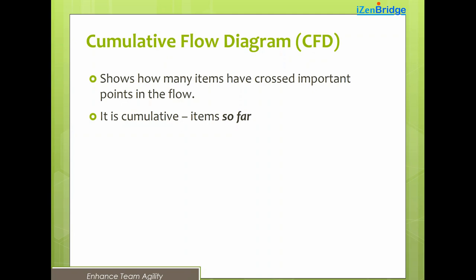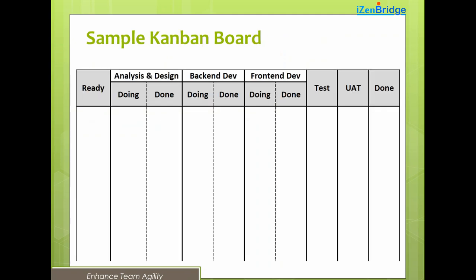The cumulative flow diagram is the most famous Kanban metric, partly because most tools like Jira support it even when they don't support other Kanban metrics. The CFD shows how many items have crossed a particular point in the flow — specifically the cumulative number of items so far. Let's look at a sample Kanban board before examining a real CFD.